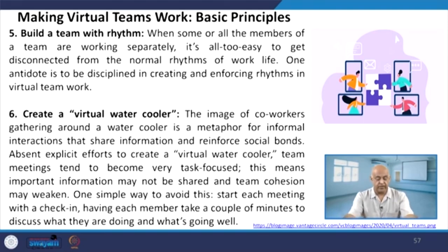A water cooler is a metaphor for informal interactions that share information and reinforce social bonds. Absent explicit efforts to create a virtual water cooler, team meetings tend to become very task focused. This means important information may not be shared and team cohesion may weaken. One simple way to avoid this is to start each meeting with a check-in, having each member take a couple of minutes to discuss what they are doing and what is going well, right?